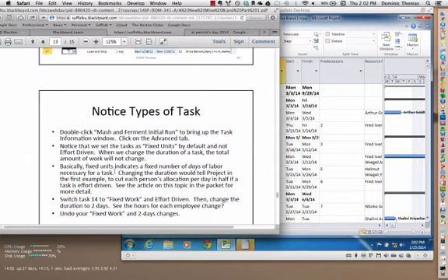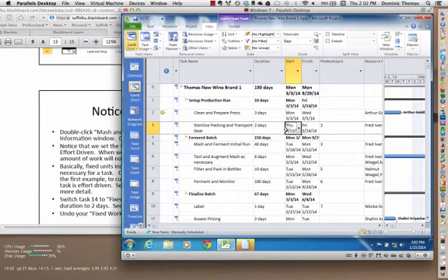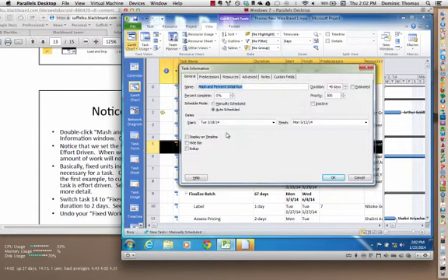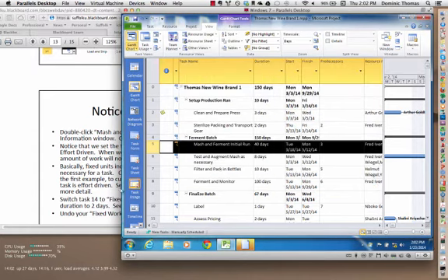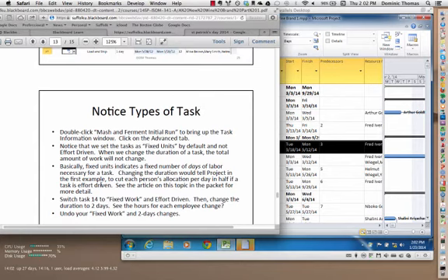And so Microsoft Project has a lot of detailed information in here that we may not usually be thinking about, but it's important for tasks if you're going to define them in a piece of software. So we can see just what we just read. Here's task type, fixed units. Effort driven is not checked, so you can't speed this up. All right, so do read through this part. This is important for you to understand about what these different pieces mean.